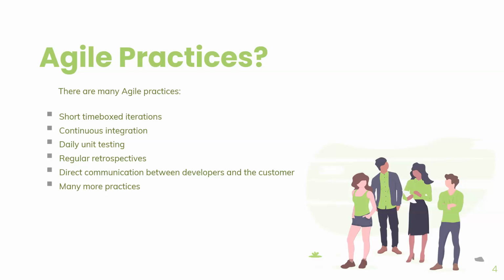So Agile says all those iterations, all those things are time-boxed. Your sprint planning, depending on how long it will be, is time-boxed. Your sprint retrospective is time-boxed, 15 minutes, 1 hour. Anything after that, let it be an email or a communication across the board. So Agile preaches against all those forever meetings and everlasting meetings.